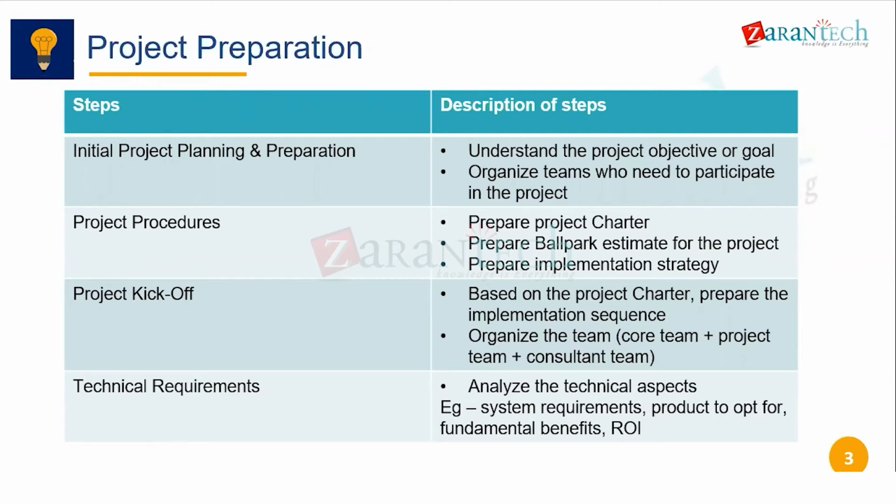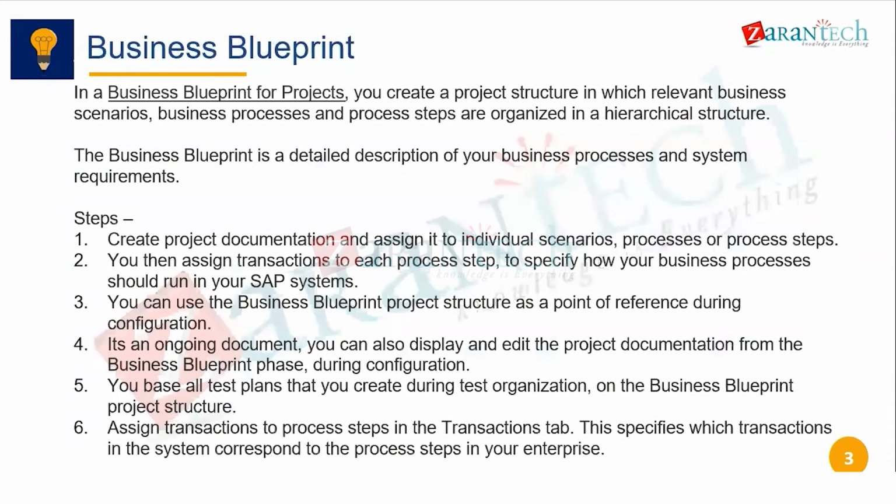So you need to factor all of that in. Generally, around 3 months is the estimated time for completion of a rollout project, but it can stretch further based on the complications of that particular country. Australia will also be around 3 to 6 months, although they have some complications, it is not so much that it requires more time. So far so clear, right?